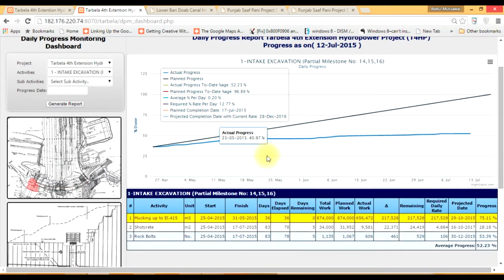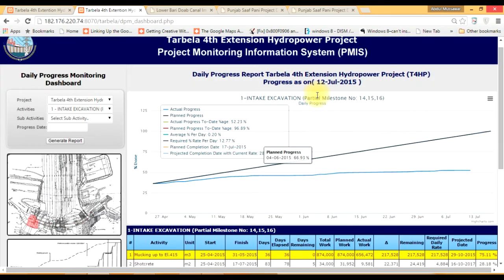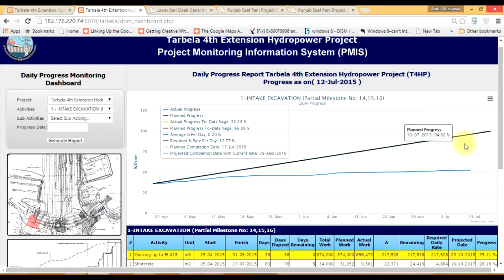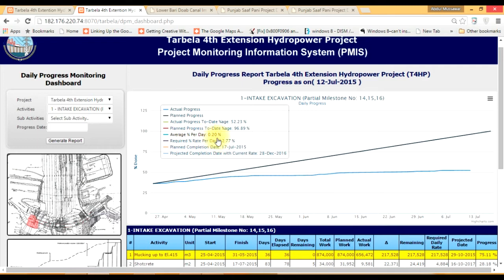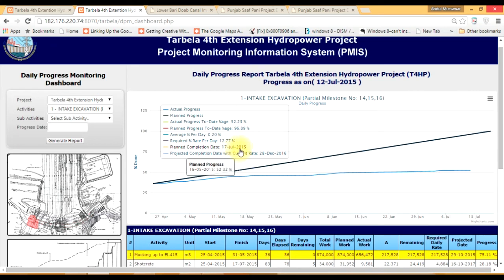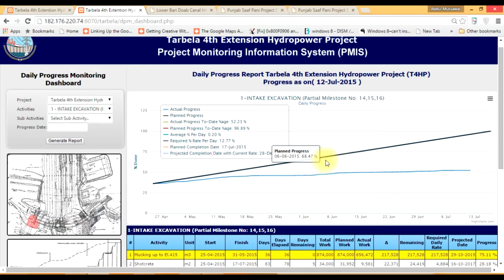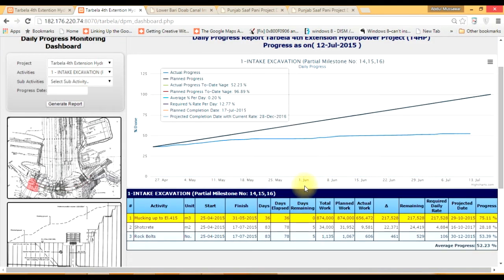This shows a line graph for that activity. There are two lines: the blue one is actual progress, and the dark blue is the planned progress. The box shows actual progress, planned progress, actual progress to date percentage, planned progress to date percentage, average percentage per day as the current progress rate, and the required rate per day to finish on time. The planned completion date was one date, but the projected completion date is different. The system has the capability, based on historic data, to predict the future date when an activity will be finished.